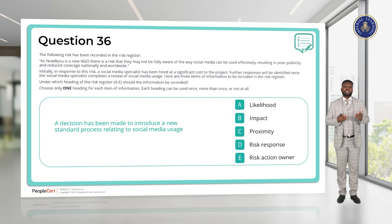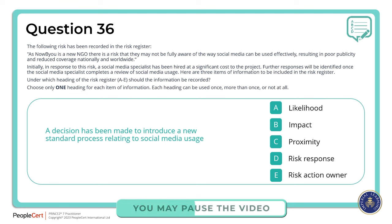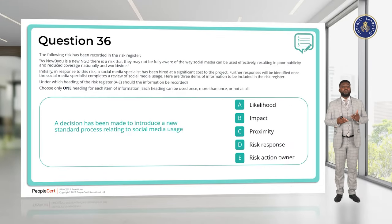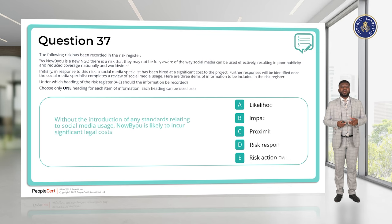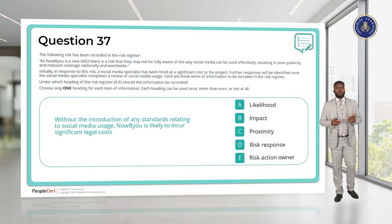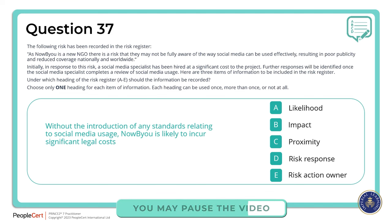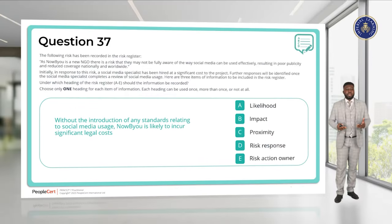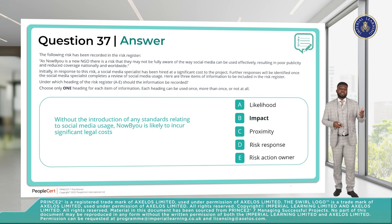Question 36. A decision has been made to introduce a new standard process relating to social media usage. This is our risk response — how we decided to deal with this risk. The answer is the risk response heading. Question 37. Without introduction of any standards relating to social media usage, Now Be You is likely to incur significant legal costs. This is the impact — what will happen if we don't do anything about this risk. The answer is B, impact.